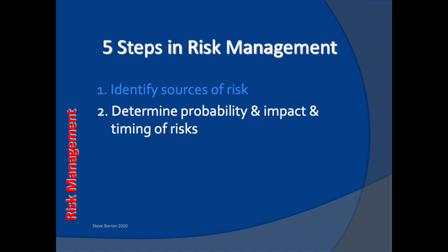A simple high, medium, and low assessment is usually sufficient for this purpose. Some projects have important safety and/or security considerations that might require more stringent assessment criteria. Some projects use statistical methods to provide a high level of accuracy for risk assessment.